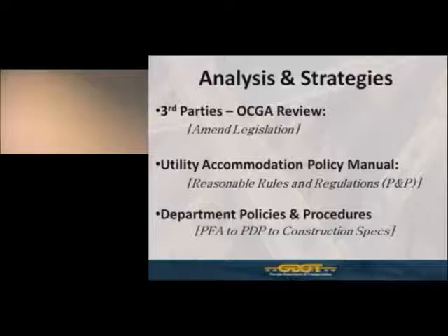The PFA is a document that is entered into by the department and typically the local government over how to manage and pay for a DOT administered project. As it relates to the utility side of things, it would cover which party is responsible for utility coordination, as well as which party is responsible for reimbursable utilities cost, if there are any. The PDP is essentially the pre-construction Bible, if you will, on how to develop a project from a concept phase all the way up to construction letting. And of course, the construction specs are the guidelines as it relates to what a contractor is responsible for, and how he is responsible for constructing a roadway project.